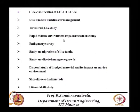There are two types of environmental studies: one is a rapid EIA study, another is comprehensive. Rapid EIA means it is for one season. There are three seasons in India: north-west monsoon, north-east monsoon, and non-monsoon. If they study one of these seasons, that is called rapid EIA. Comprehensive EIA is now being asked for most projects. Most atomic power plants are required to do comprehensive EIA. There are zones of accretion and erosion already identified along the Indian coastline — wherever the erosion rate is very high, more than one meter per year, you have to do a comprehensive EIA study.